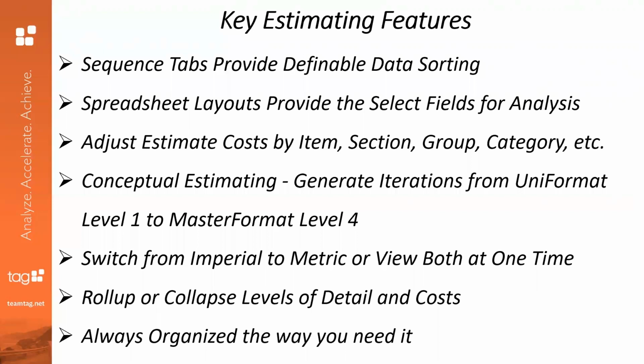Conceptual estimating is ideal for this, where you can actually generate cost iterations from conceptual, which is often used in Uniformat at level one, and take it all the way on through to a more complete detailed estimate with MasterFormat as high as level four, or even five for that matter. You can switch from imperial to metric or view both at one time. The information rolls up and collapses at multiple levels of the coding system.